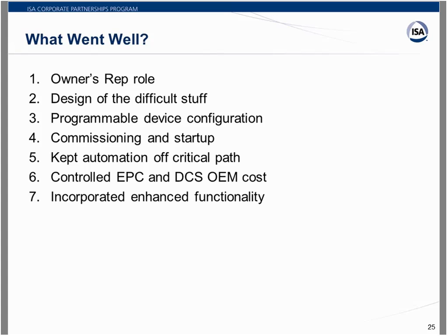They were able to keep automation off of the critical path, except, of course, during that final automation system commissioning step. They helped to control the cost that the EPC and the DCS OEM incurred, not going with the most expensive DCS solution, and providing expertise in areas where the other entities might struggle and burn a lot of hours. The automation owner's rep was able to accomplish those tasks more efficiently and more quickly.